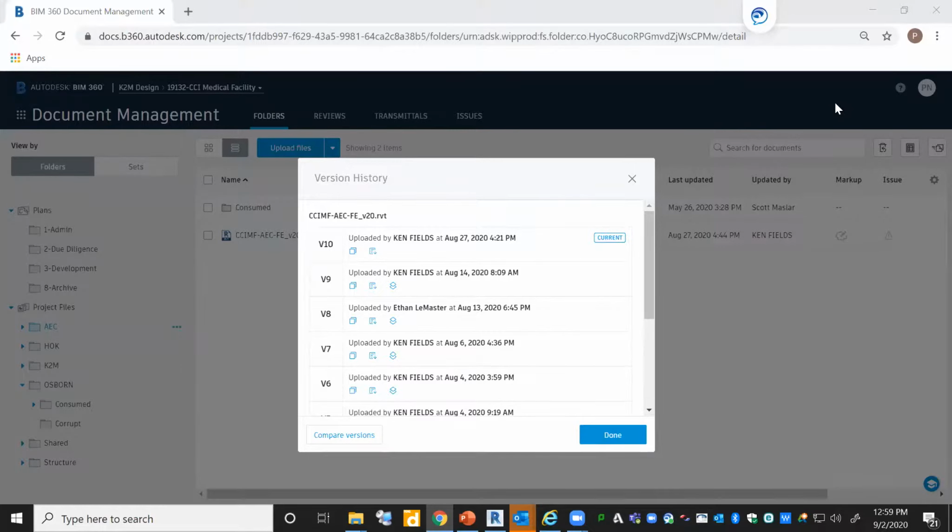Maybe some ownership verbiage in the proposal as well. Yeah, I think it'd be beneficial to do an occasional archival download of the published versions. That can be established as once a month or once a week. You just go in there, download it, and save it to an archive folder on the server. Especially for other people's models.